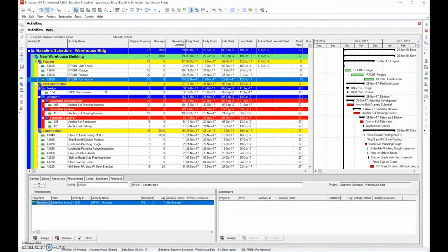Now remember that if that last schedule update had that 27 days and you expect to get compensated for that 27 days, you're not going to subtract it. Okay. Well, if you're going to get it back from the government or the client, that 27 days, you should subtract it. But the entire point related to that is that you don't want to ask for it twice. Okay. But in this scenario, we said that we own that 27 days of negative float.